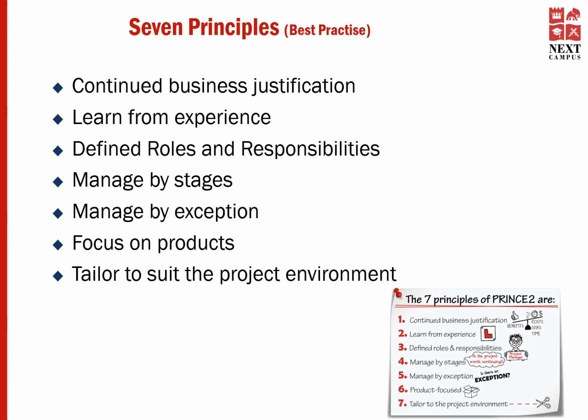Making changes and dealing with issues can often mean that the project needs some more time or some more money. Do the decision makers in the project want to deal with each and every one of these every time it arises? Probably not. So to overcome this and support this principle, your organization will provide the project with tolerances within which to work.